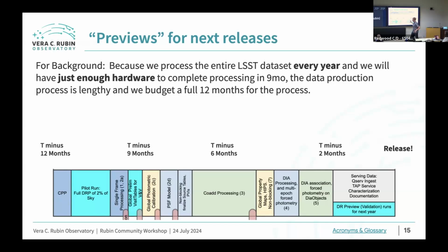You see that we have the hardware to support getting this all done in about 9 months. We need a bit of time at the beginning and the end to prepare it both scientifically, with some precursor runs, and to prepare it for the users in the science platform. But basically that entire 9 months in the middle is spent churning data through on all the CPUs.